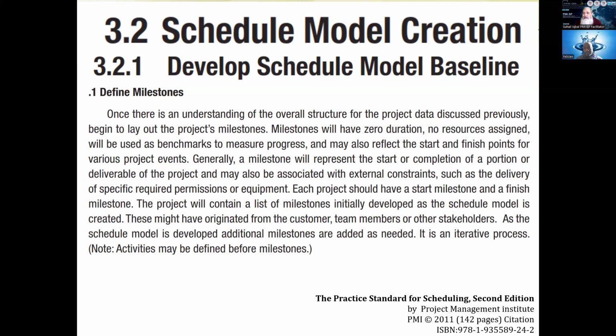The biggest milestone of a project is the beginning of the project. And the biggest milestone at the end is the finishing of the project. So you see, what is the characteristic of the beginning of the project? That a lot of activities can simultaneously start at that point in time. And at the ending of the project also, all the activities will converge to that single point.